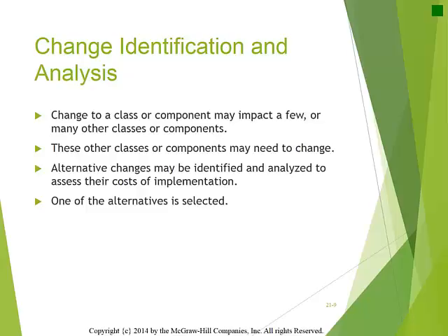For example, if it is costly or time-consuming to change a component and there are commercial off-the-shelf alternatives, then changing the component as well as using COTS should be identified as alternatives. This information allows the change analysis step to evaluate the options and select a viable option to pursue. Sometimes it is difficult to fix a component, to remove the root cause, but it is relatively easy to change a different component to fix the problem, at least temporarily.